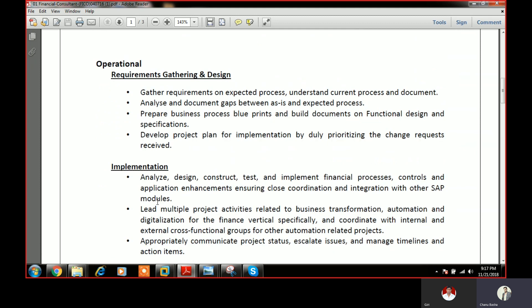Implementation is a very important step. Every SAP consultant needs to know what integration and implementation involve. In the implementation stage, first you analyze, then design, construct, and test. Analyze corresponds to the business plan and project preparation; design is the business blueprint; construction is configuration; and testing is the final completion. This is end to end — not just simple configuration. You are involved from the first step to the last.